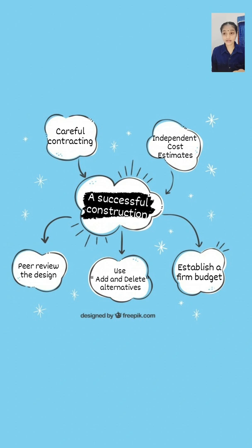Peer review involves an independent architect or engineer reviewing the plans in an effort to uncover errors, omissions, and inconsistencies. The modest cost is justified by avoiding the delays, disruptions, and extra costs which usually are involved when design errors are discovered in the field after construction is underway.